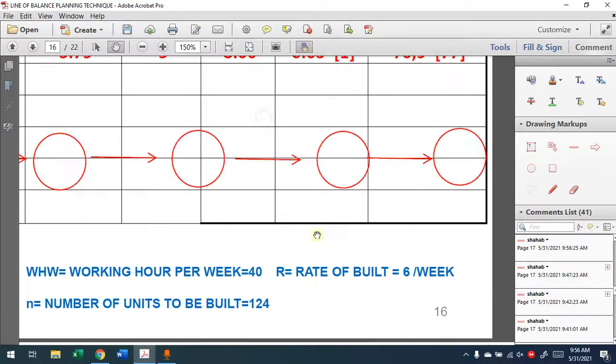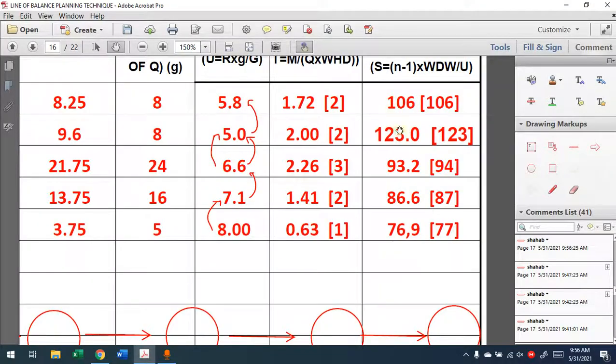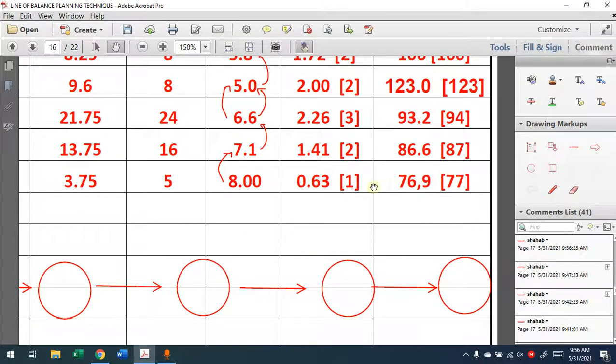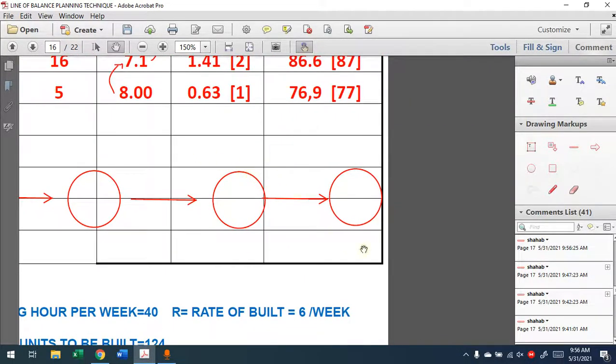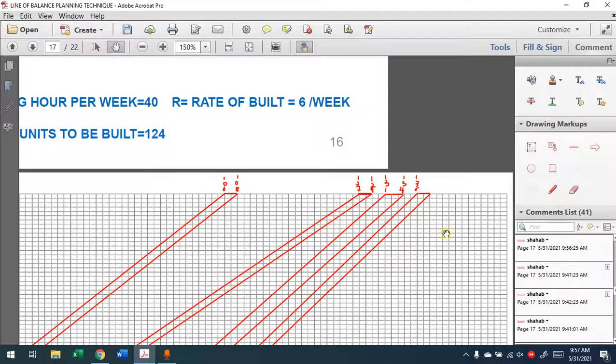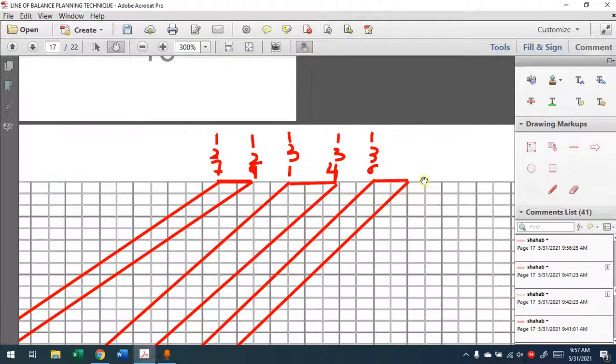Well, continuing, we have the last activity, the fifth one. The natural rate is higher than the one it depends on, and it has 1 day duration, with 77 between the top and the bottom line. Well, we start again from the top. We'll add 2 days to the top. So if this became 136, this will be 138. Then we add 2 days, which will be 140. It's the starting day, and it's only 1 day, so we have a one day duration activity.